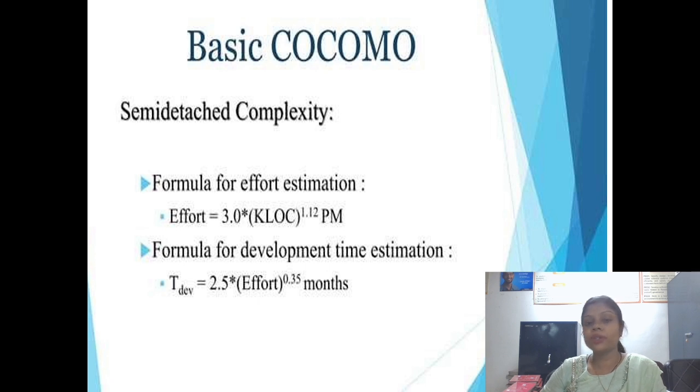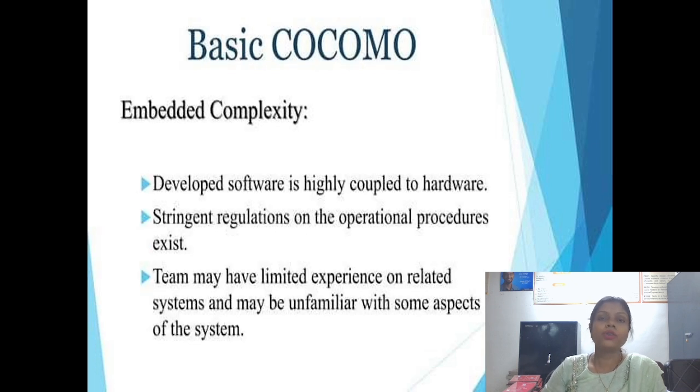Effort is equal to 3.0 into KLOC to the power 1.12 person-months. Or development time estimation: time of development is equal to 2.5 into effort to the power 0.35 months. Next is the embedded complexity. First is the organic, meaning a small project. Second is the semi-detached, meaning experienced and non-experienced members were both there. Third is the embedded, where hardware and software are both coupled in this embedded complexity.